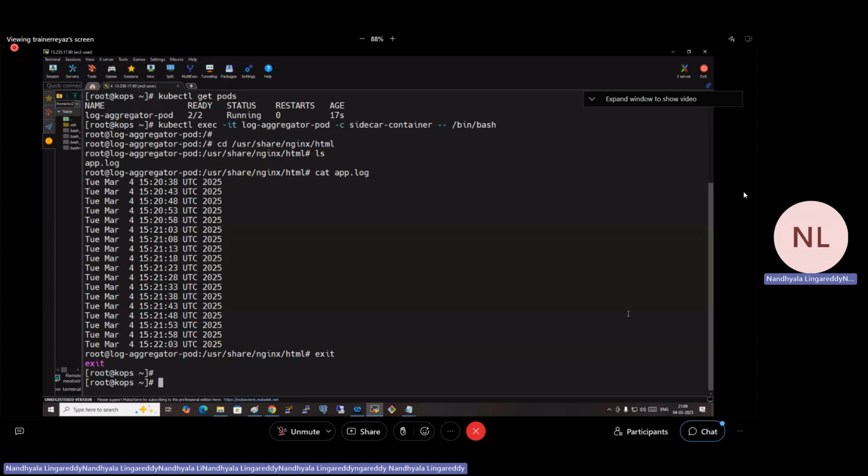Every day we'll have a Scrum meeting in the morning, and all the tasks need to be updated in Jira. Overall, I will not be sitting with the team members. I'll be sitting with the Scrum Master and the Principal Architect. They tell me the status of this 1 week, and I'll get the status of everything on top, right?